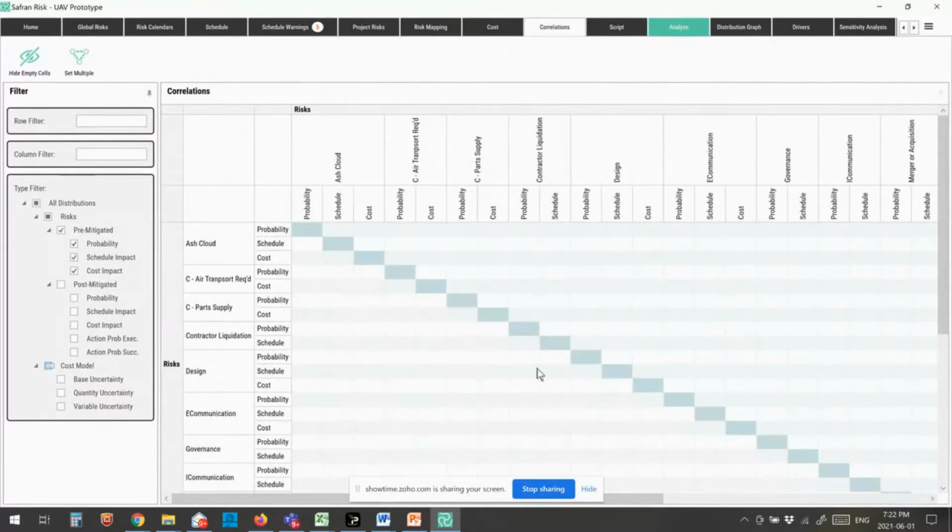But I can enter all of these in, so I can say, okay, if we have trouble with driving piles, we're probably going to have trouble with excavation because probably the soils report is bad. So it gives us a lot of capability in terms of doing our correlation, and it's very flexible and very easy to work with.